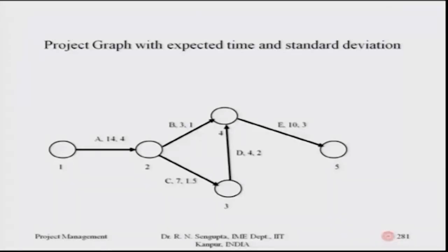Again, the important assumption is that the activities are independent of each other, hence you add up the variances, not the standard deviations. Consider the graph, which is exactly the same as before; the only thing added in this case is these numbers.